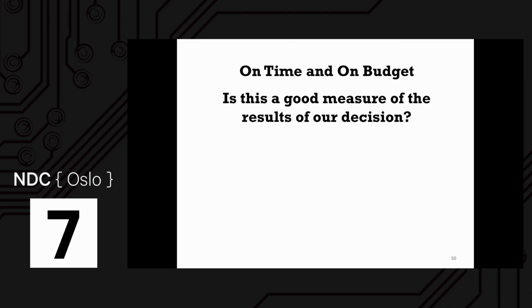I'm not really going to ask you to say it out loud, but think about that for a moment. If you get the project done on time and on budget, what do we really know? It might be that we padded it, like you were saying here, so much that we couldn't get it wrong. And once we padded something that much, we end up using all the time we allocated for it. I've seen that also a lot of times. Hopefully you haven't much, but it's not uncommon.